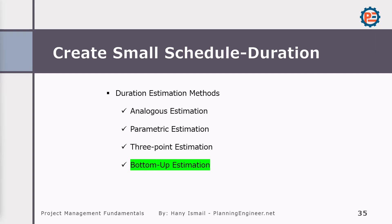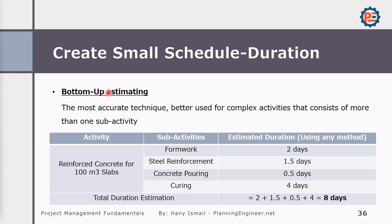The bottom-up estimation is the most accurate technique, better used for complex activities consisting of more than one sub-activity. For example, reinforced concrete for 100 cubic meters of slabs is decomposed into: formwork 2 days, steel reinforcement 1.5 days, concrete pouring 0.5 days, curing 4 days — giving a total duration of 8 days.